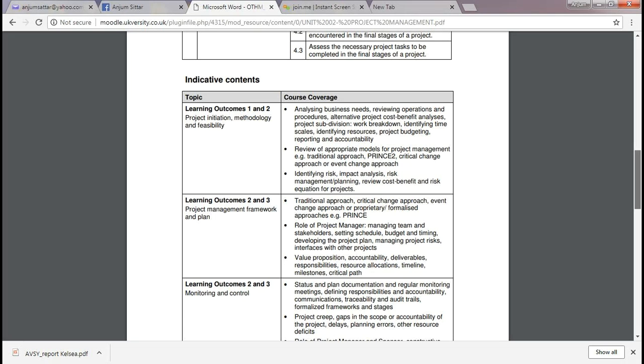That's really important. Setting the schedule, of course, the time frame: when the project will start, when the project will be finished. So in project management we normally use early start, early finish. How early can we start the project? One activity can be linked to another, some activities we can do in parallel, but some activities we can't start until we finish the other activity. Like building a house, you can't start finishing the house or the windows until you build the structure of the house.